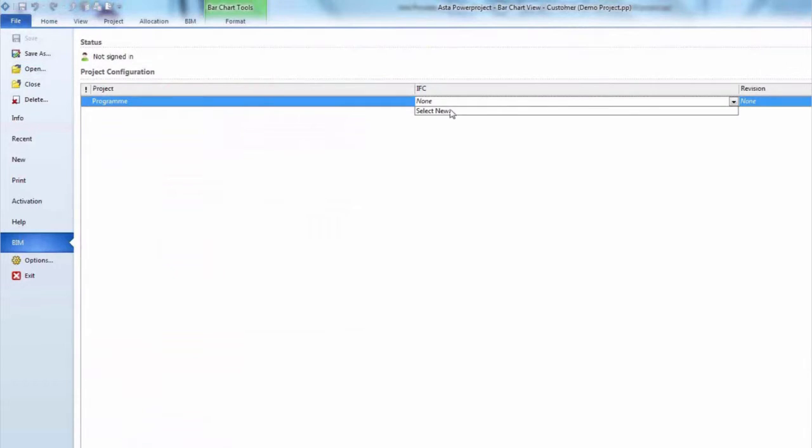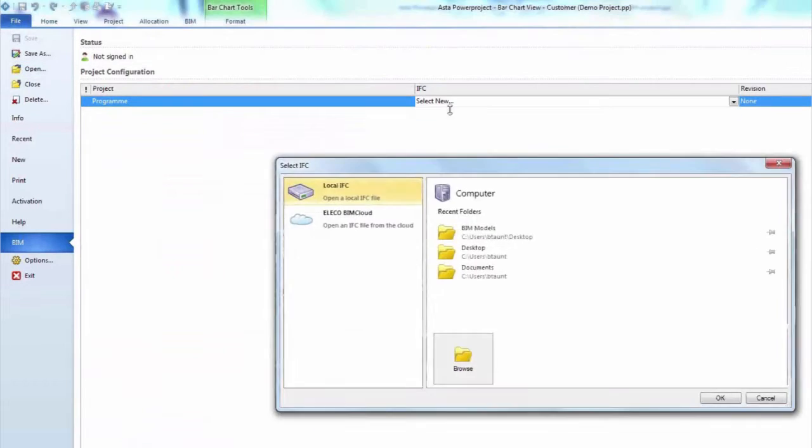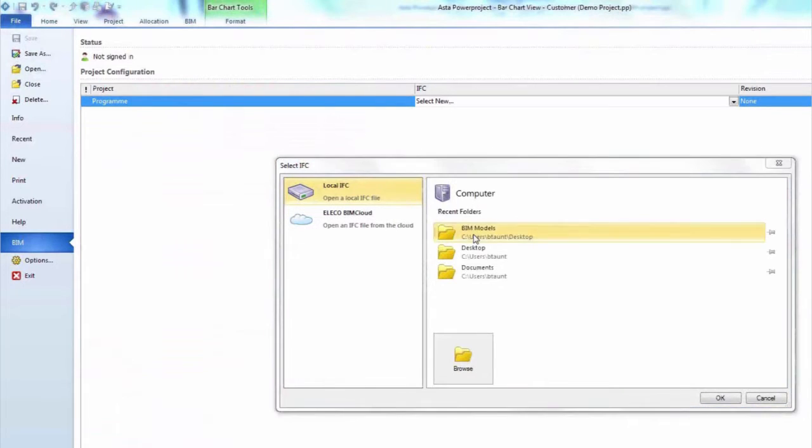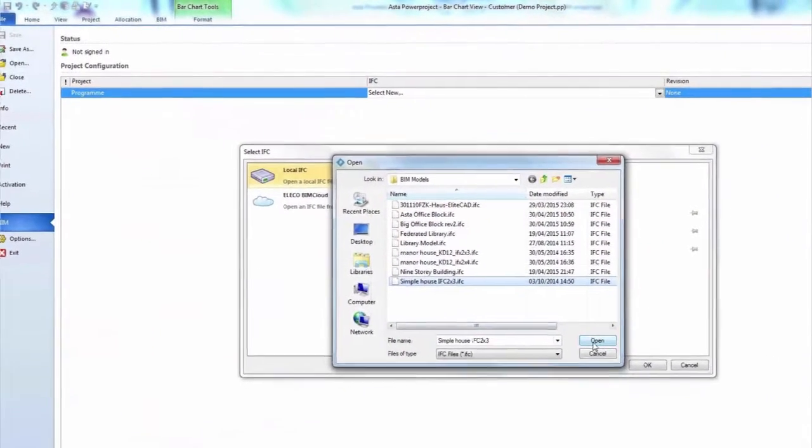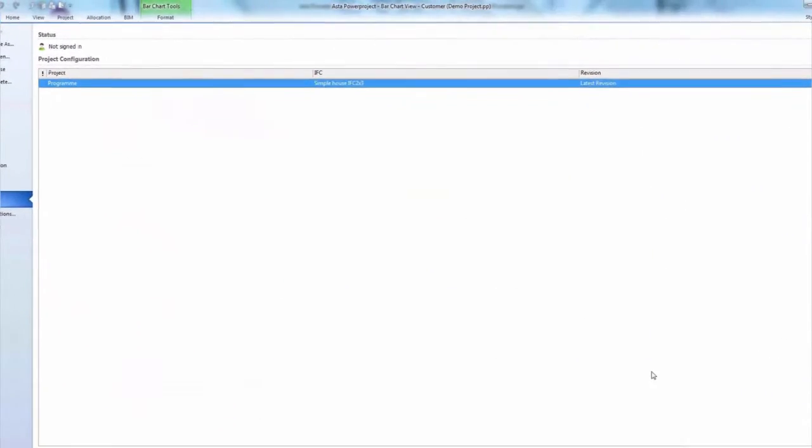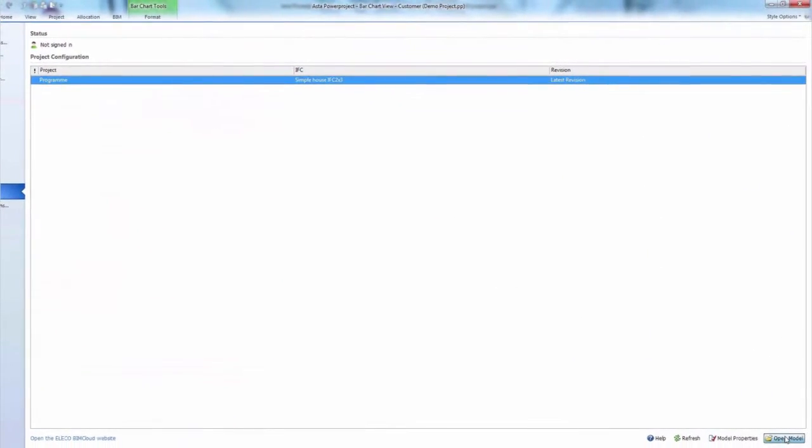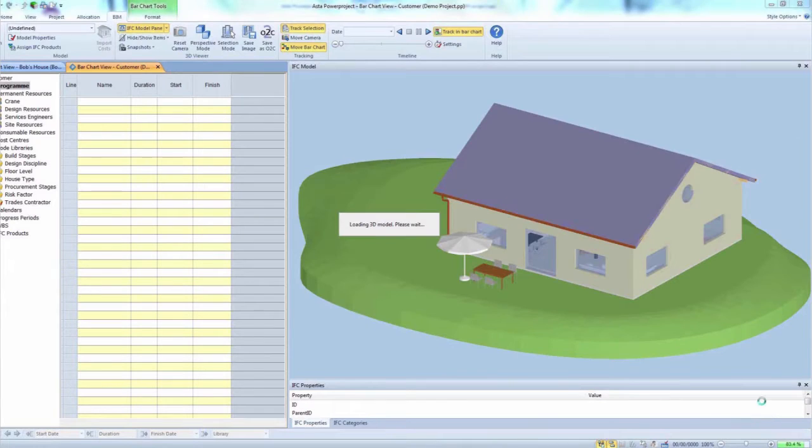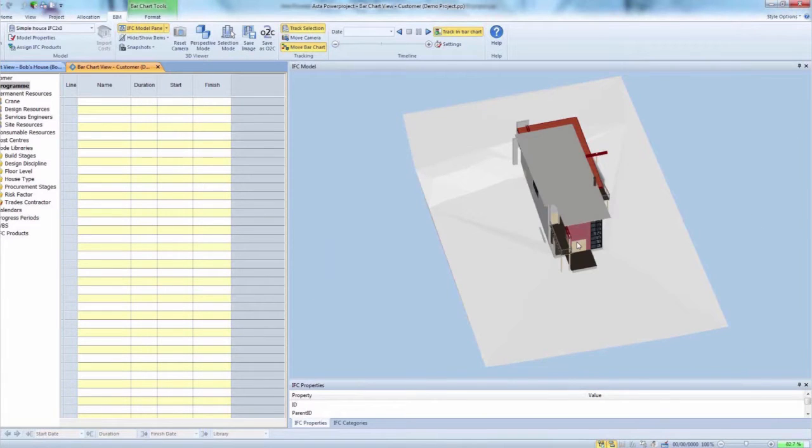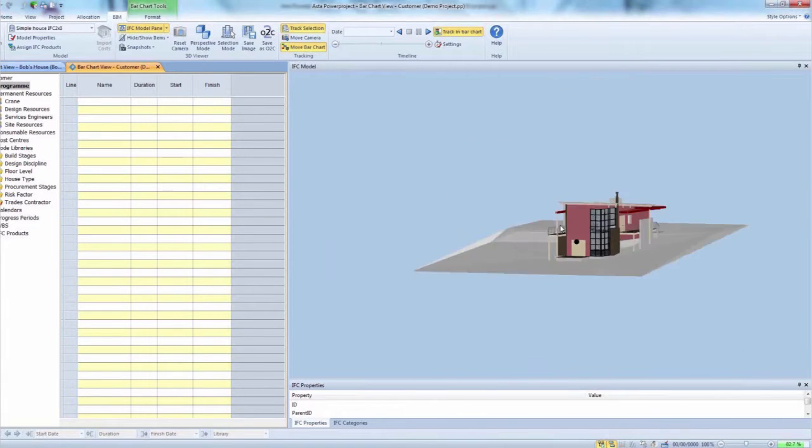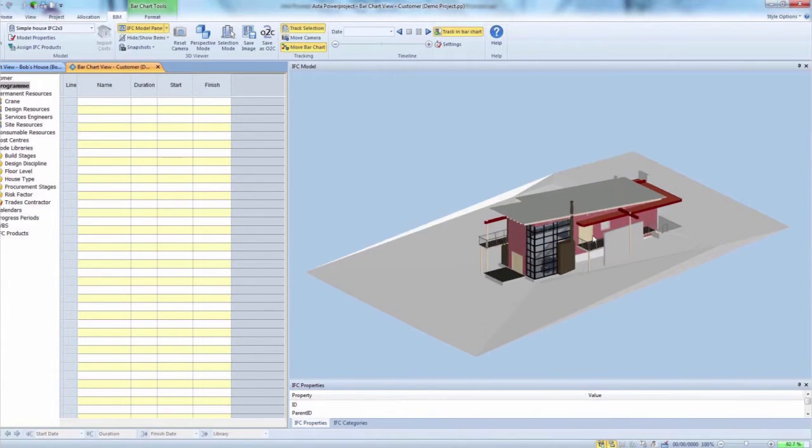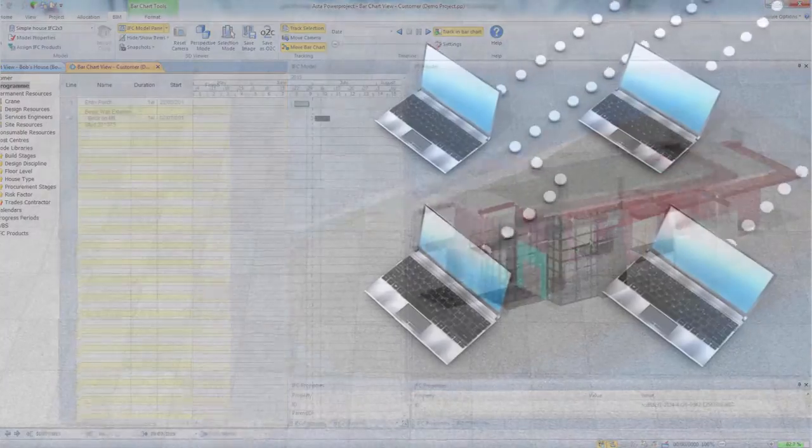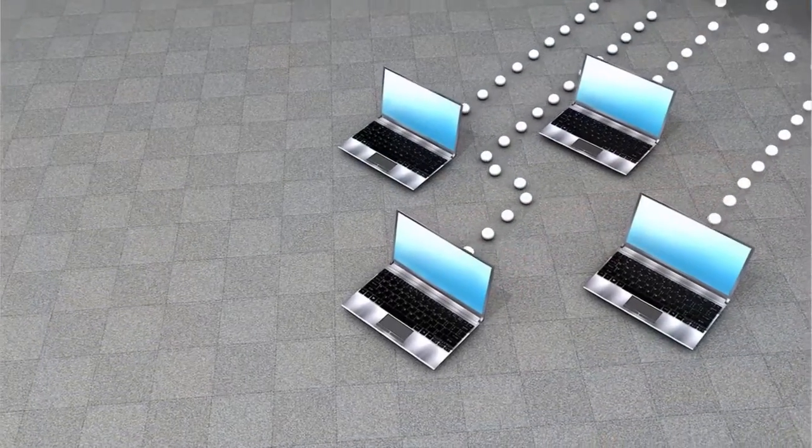Aster Power Project BIM requires a 3D model in the IFC file format, which is a vendor-neutral, common data schema to hold and exchange relevant data between software applications.